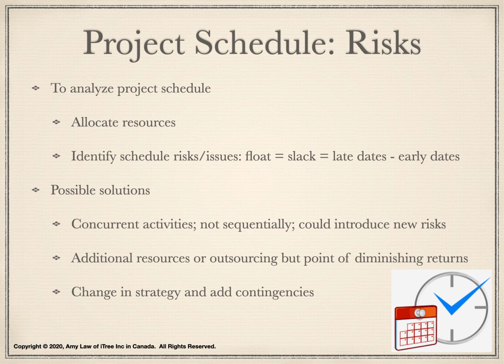After the project schedule is developed, we analyze the schedule to allocate appropriate resources. We also take actions to address schedule risk and issues. Remember to keep in mind our business benefit. In project management, float, also known as slack, is the amount of time an activity can be delayed without impacting subsequent activities or the overall project completion. The total float is equal to the late date minus early date.